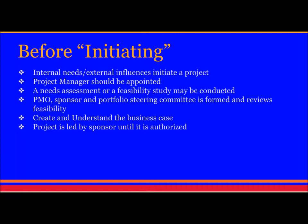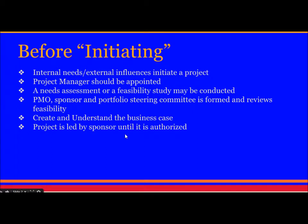First, internal needs and external influences should be analyzed to initiate the project — these are the reasons why a project is initiated. The project manager should be appointed, a needs assessment or feasibility study may be conducted, and a PMO, sponsor, and portfolio steering committee is formed to review feasibility. The business case is created and understood, and the project is led by the sponsor until it is authorized.